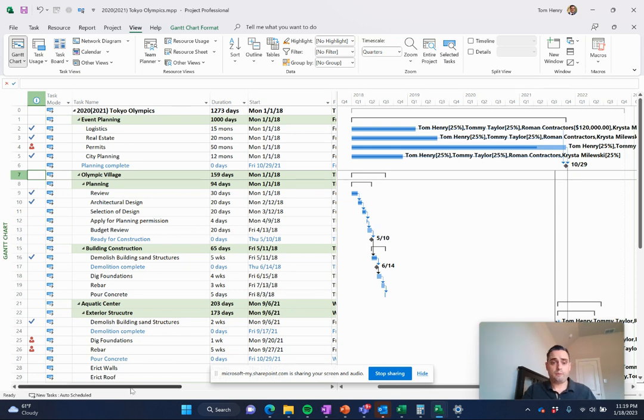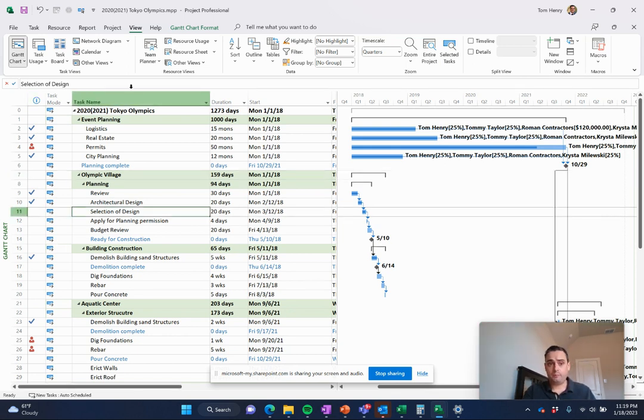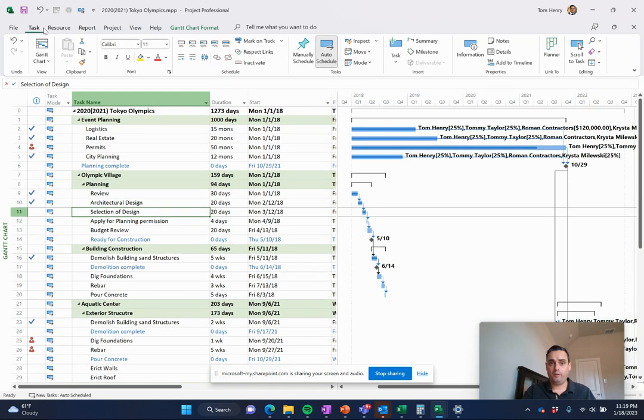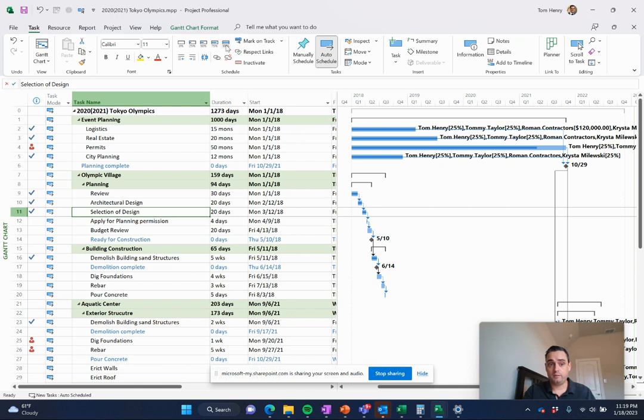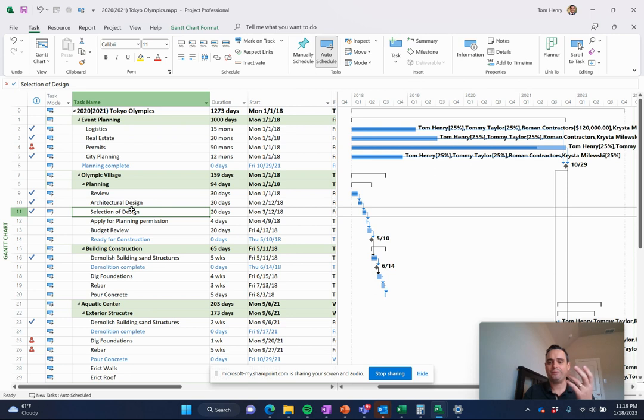We can track the project end to end. So as tasks become marked as complete, you can do that in various different ways. You can track how many hours have been worked, how many hours are left, or you can track just a typical percentage of that task that's been completed. You see, I just come in here and said this one's done. Structural design is done. You can track when they're actually finished and actually started as well.